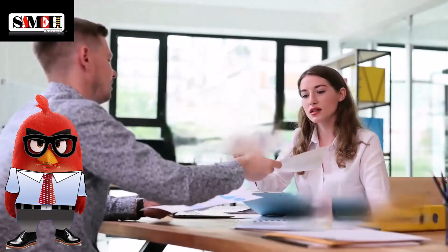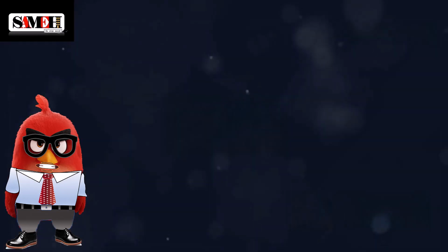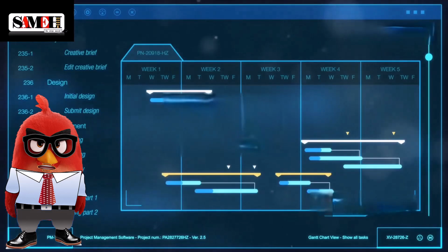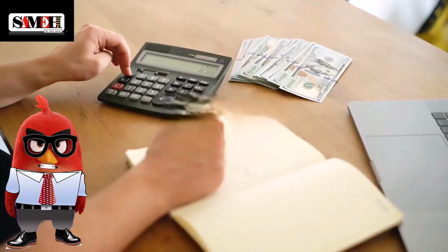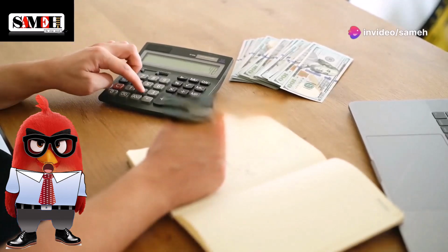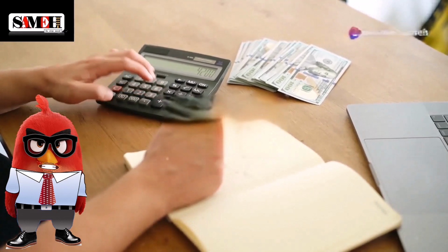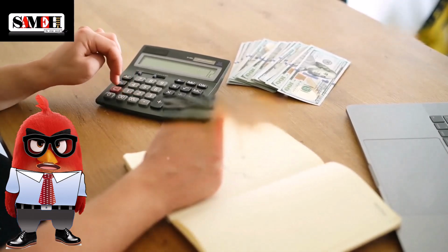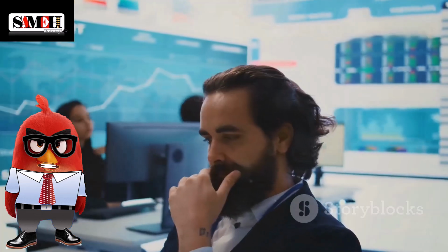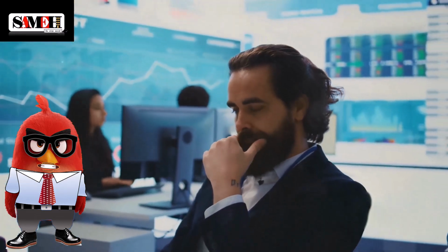BL Budgeted Total Cost, BTC, is your project's financial starting point. It's a fixed value representing the total cost of your project as planned at a specific moment, typically at the beginning. Calculating BTC is straightforward. Sum up all costs based on your initial project plan and estimates. This includes labor, materials, equipment, and other expenses.